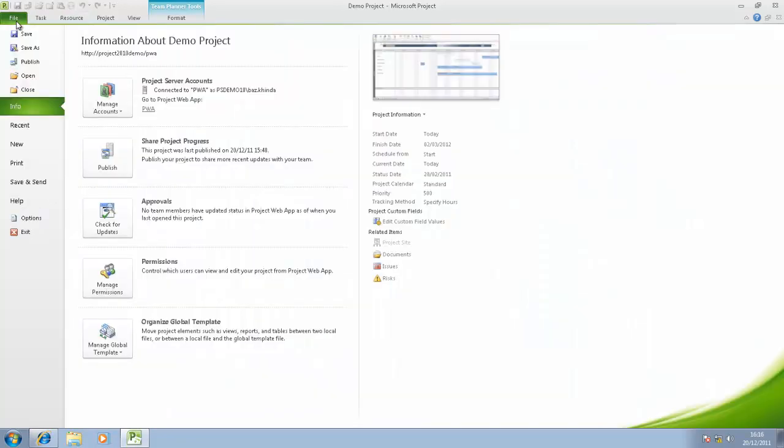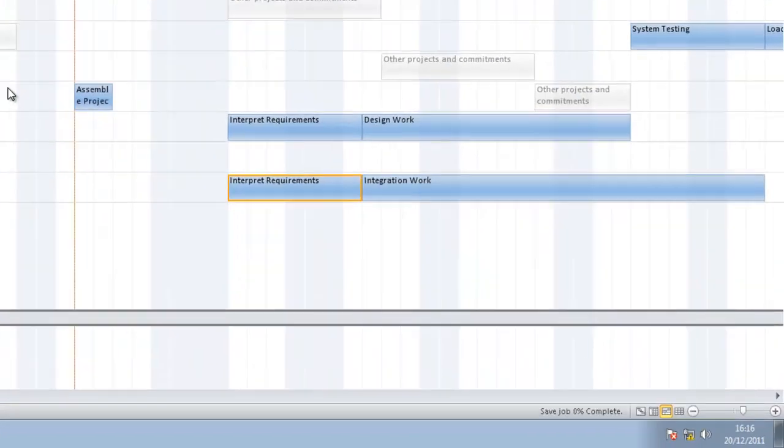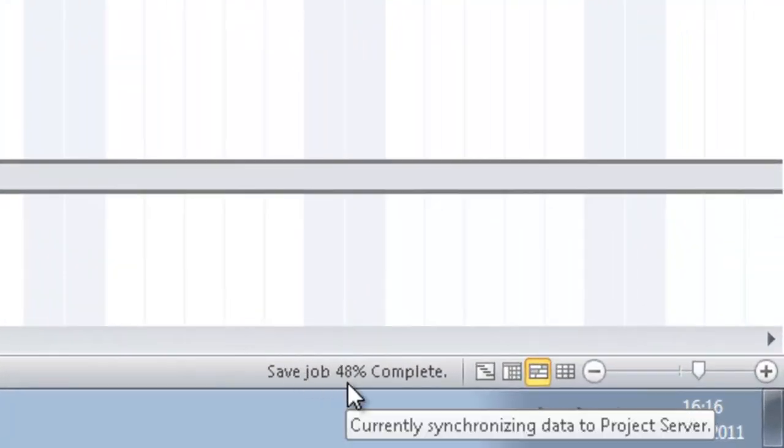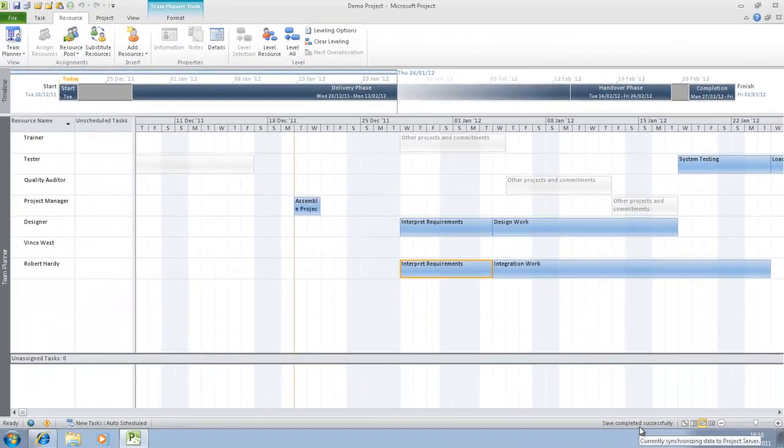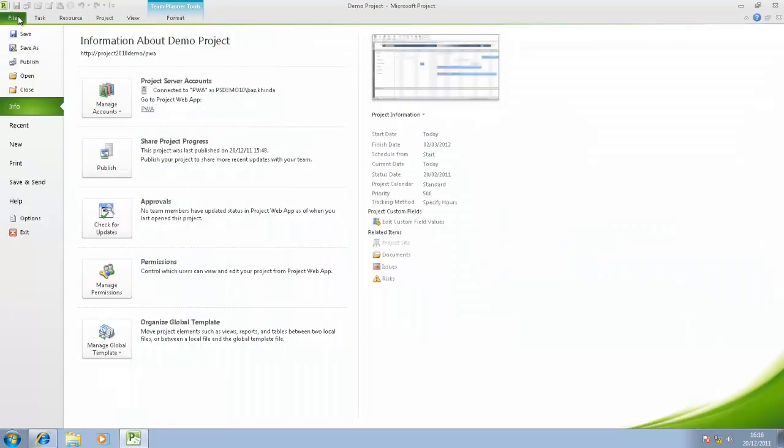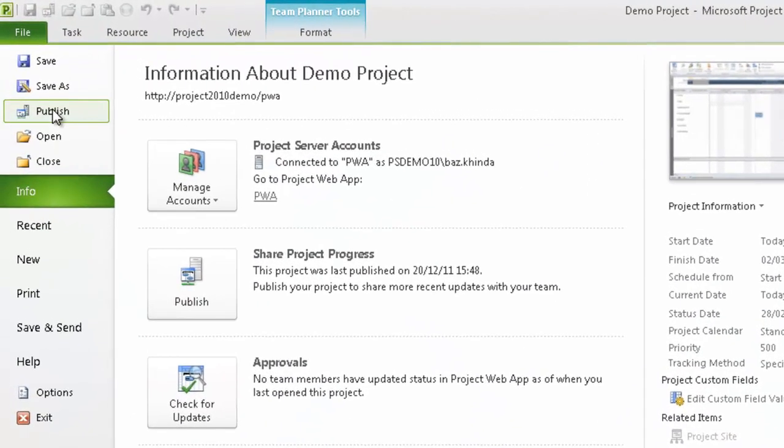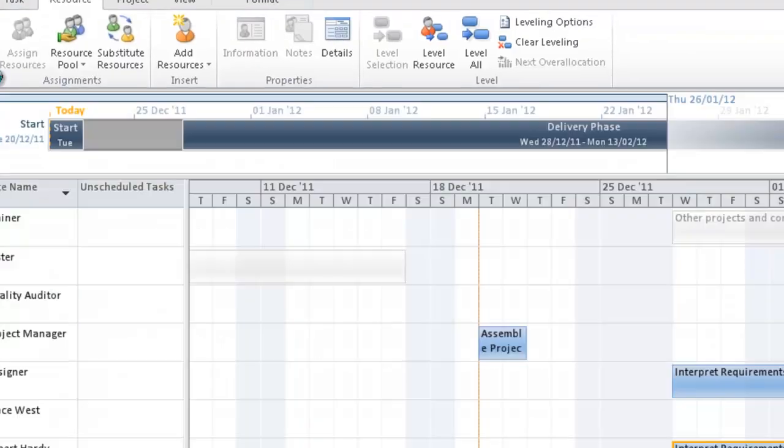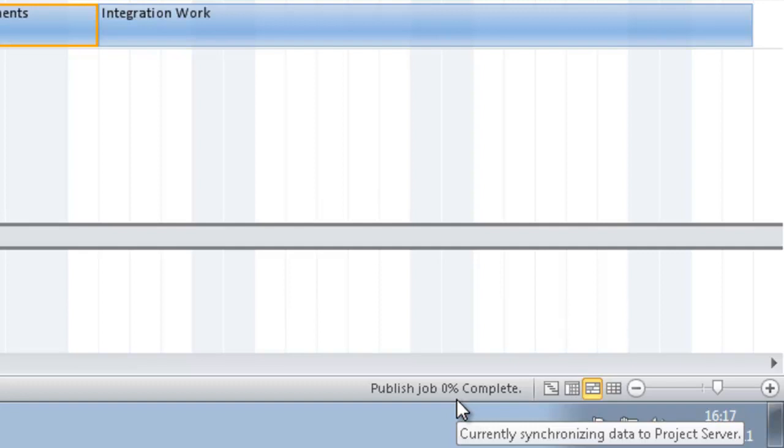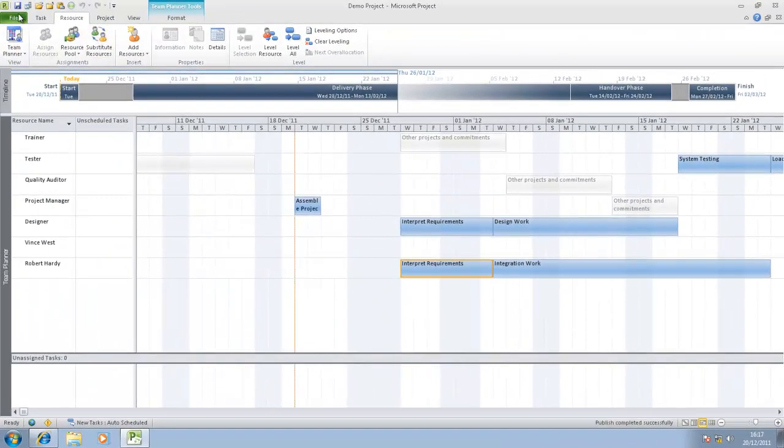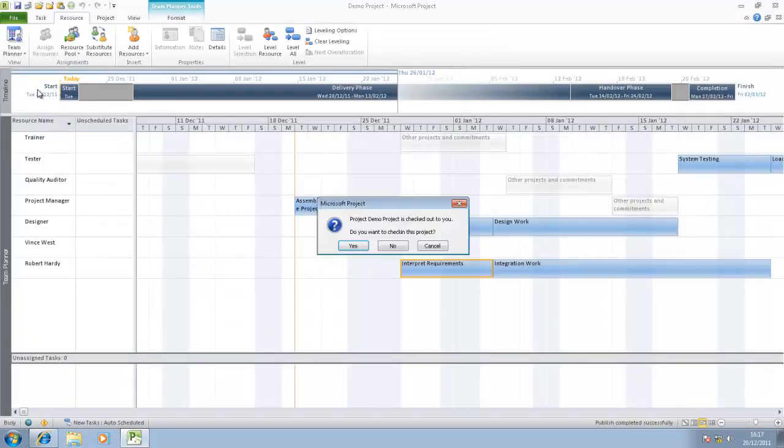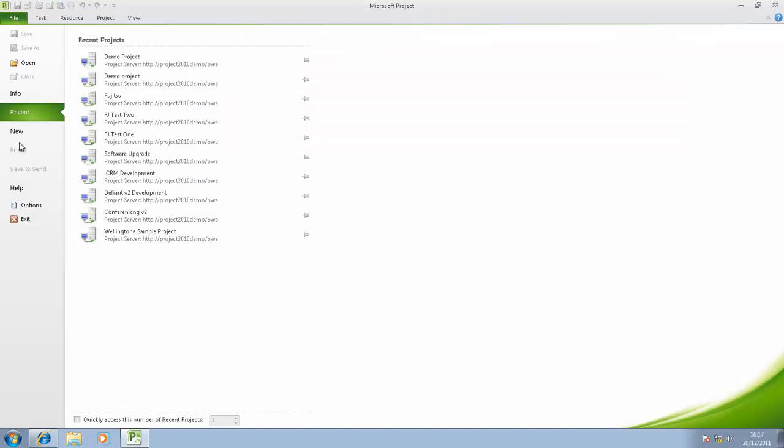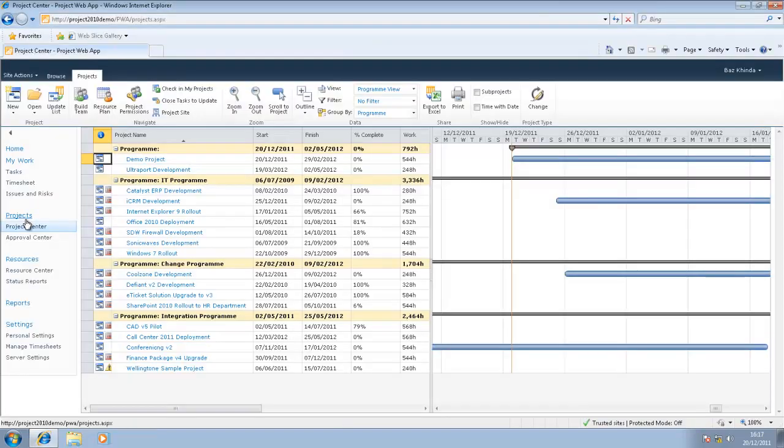What I'd like to do now is file, first of all, save this particular project. That's currently saving, and we can see an indicator down here. Now that that's saved, what I need to do is publish this project so that all the work gets pushed out to Robert Hardy and to Vince West. So click publish, and down here we see what is going on. That's now being published, so if I go back to file, close. Yes, I want to check the project back in, and I'll go file, exit.